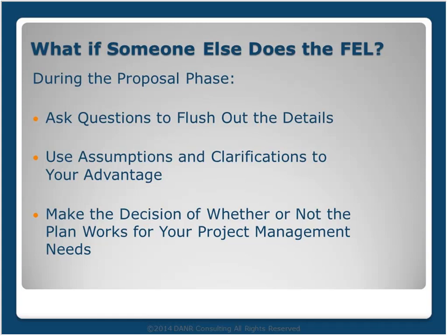Second, use assumptions and clarifications in your proposals to define it to the degree that it enables you to show your expertise and feel comfortable with your bid. So, for example, if you don't see the project management responsibilities that we just talked about adequately defined, then state your assumption. Say, since it was not specifically identified in the RFP, we have assumed monthly reporting with our attached basic project management report, and you include that template. And then what you've done is you politely pointed out the gap in the FEL documents of the RFP, and you've also protected yourself financially by establishing the terms of your bid.